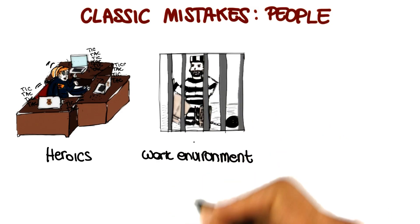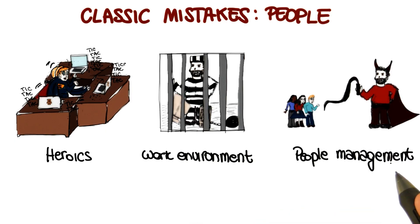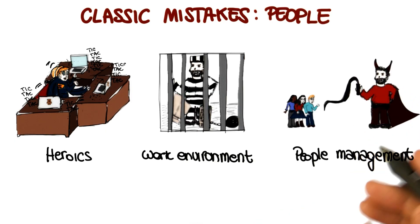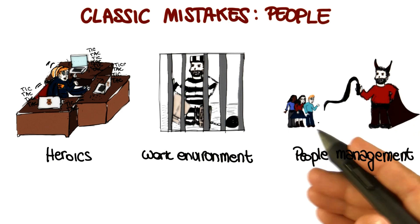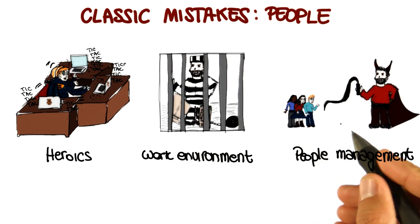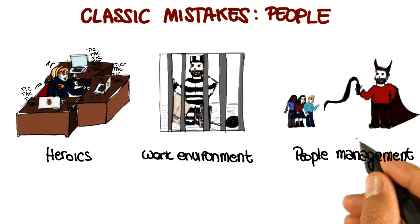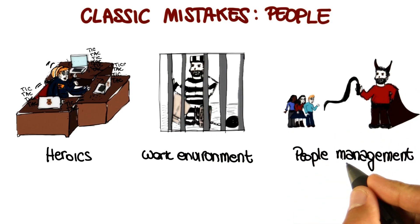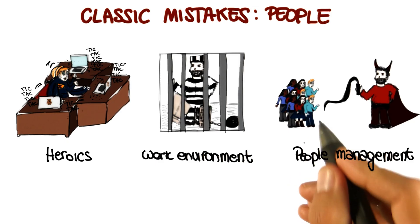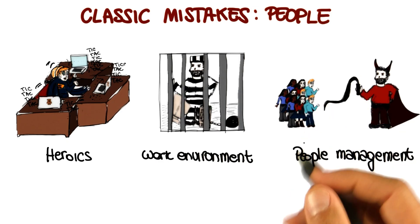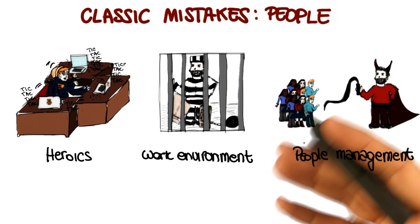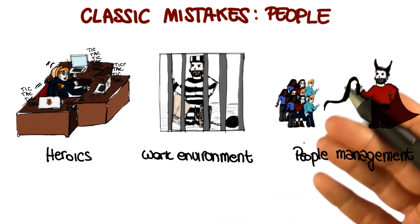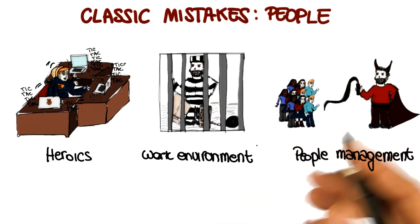Some of the most important people-related mistakes are due to poor people management — for example, lack of leadership, or leadership exercised in the wrong way, which can lead to very unhappy personnel and therefore low productivity, or even people leaving teams. Another classic example of poor management is adding people to a project that is behind schedule, which never works. Why doesn't it work? Because these new people need to be brought up to speed, and that causes further delays rather than improving the project schedule.